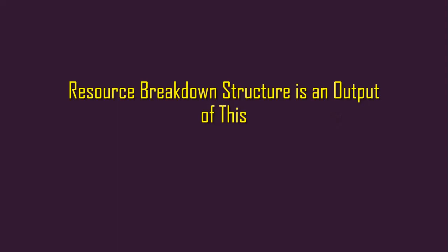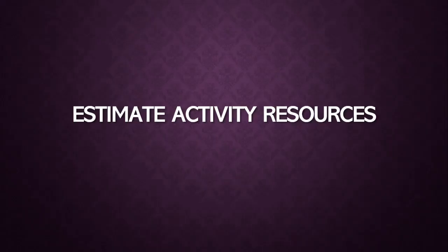All right, 3, 2, and 1. The answer to this is estimate activity resources. This is where the resource breakdown structure is an output.